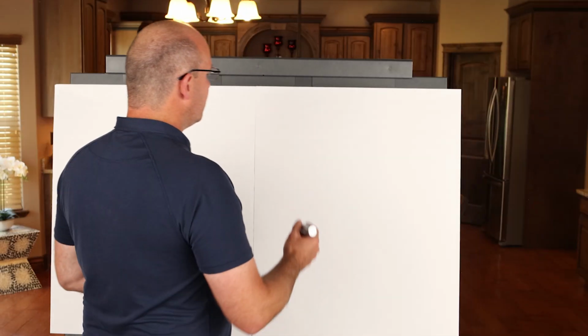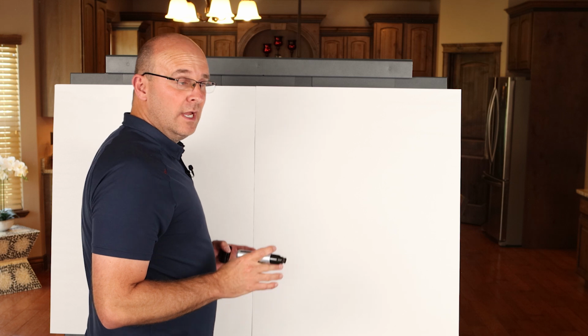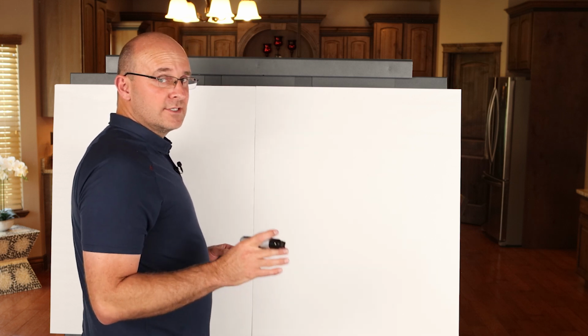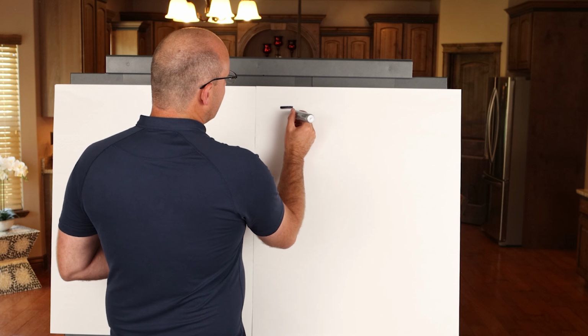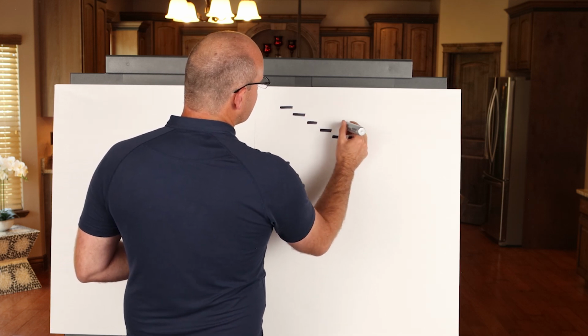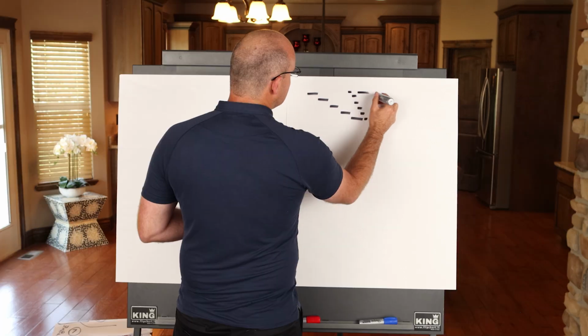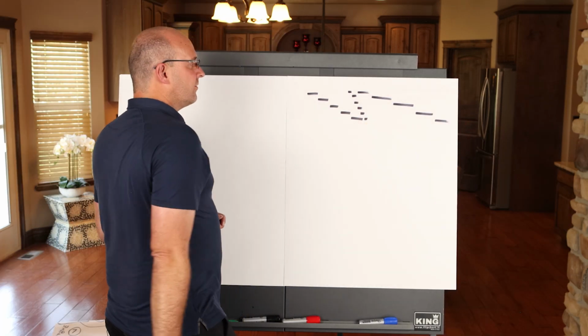Takt time also allows you to synchronize the speed of the different trades, because flow really comes from trades going the same speed, the same distance apart. So if you have a trade partner that's going a certain speed, and other trades that are going at different speeds, you can see that that extends your overall project.